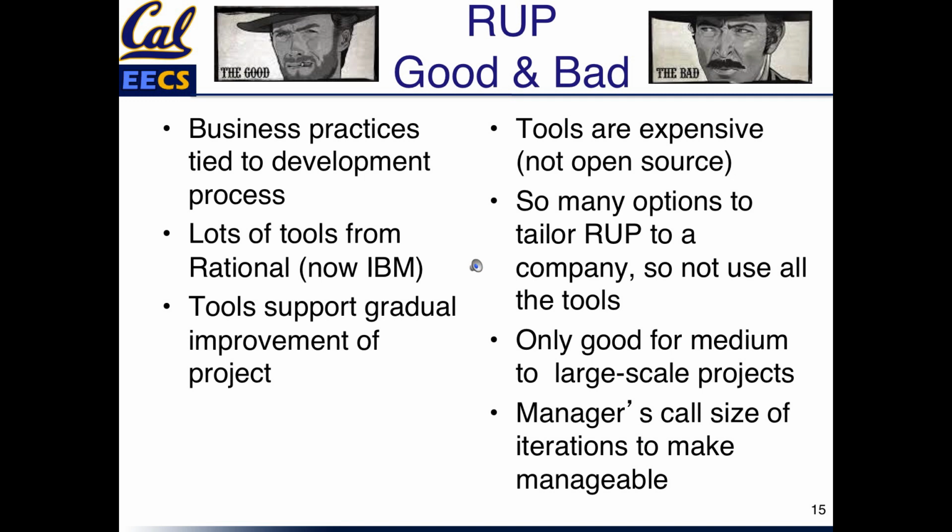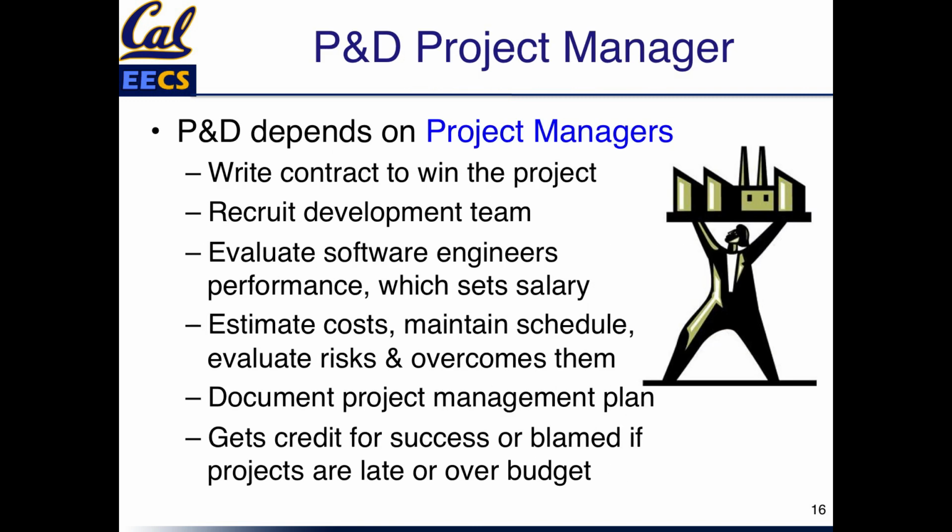There are a lot of ways to tailor it, how many phases, how many iterations, business models, so you may not use all the tools. It tends to be good only for big projects because it's expensive, with a lot of overhead. And it's up to the manager to decide how long an iteration within one of the phases should be, so it's the manager's experience. And in fact, what's true about all of these projects is they expect a strong project manager.